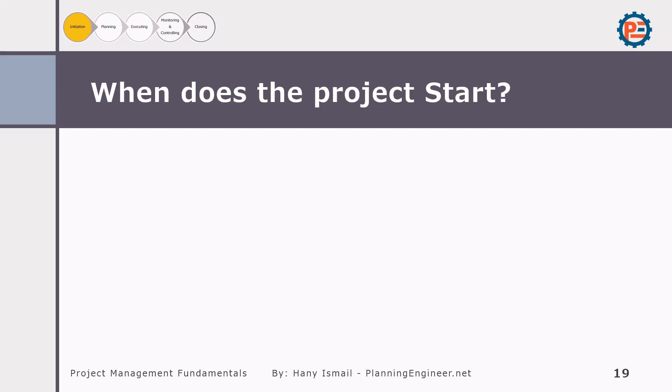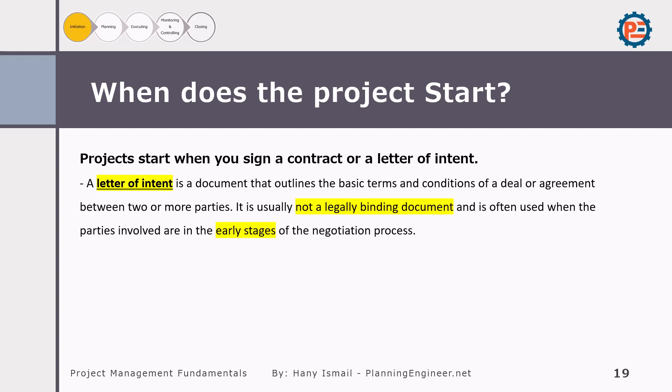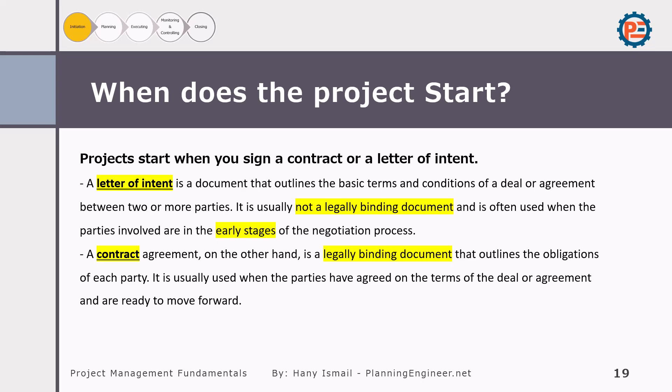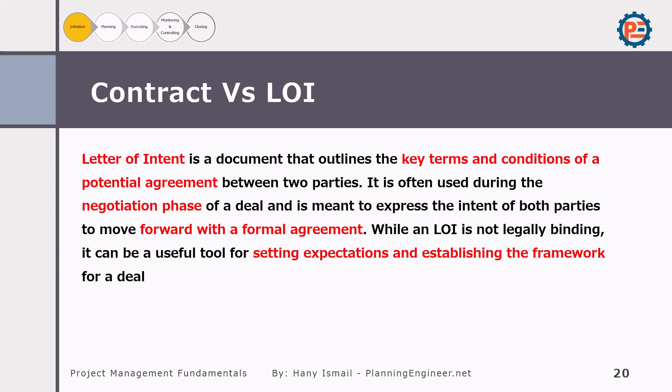The final stage of the tender process is contract signing, when the client signs a formal construction contract with the awarded bidder. At this point, all parties should be clear on their roles, responsibilities, and obligations. A project officially starts when you sign a contract or Letter of Intent. An LOI is a document that outlines the basic terms of a deal, often used during early negotiations, and is not legally binding.